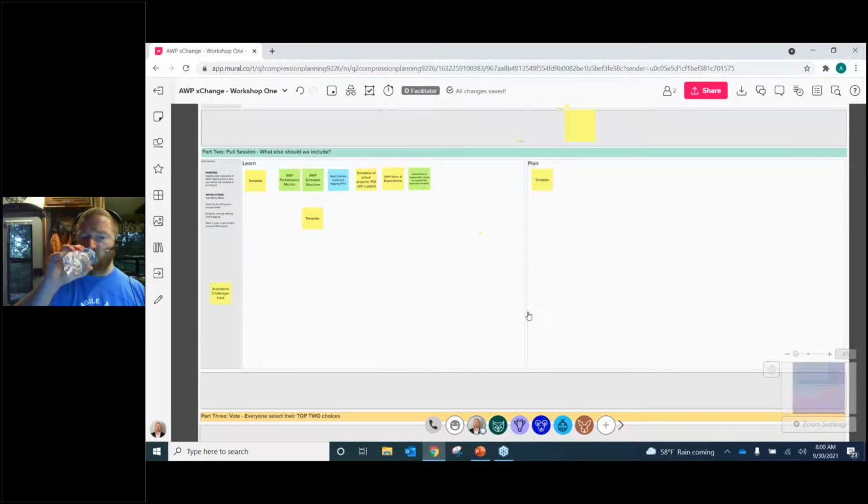In other words, you set an ETL, a protocol of data interface, somehow. Yes, okay. Absolutely. And the best interfaces are the API ones, because that doesn't involve a human sitting in the middle. Some interfaces get a bit more complicated, like Primavera, for example. It's very easy for us to pull information from Primavera. Very rarely do we get a client who wants us to push information back to Primavera, because at the minimum, they're going to want a planner scheduler sitting in the middle to double check the information. They don't like that automatic refresh of information in P6.